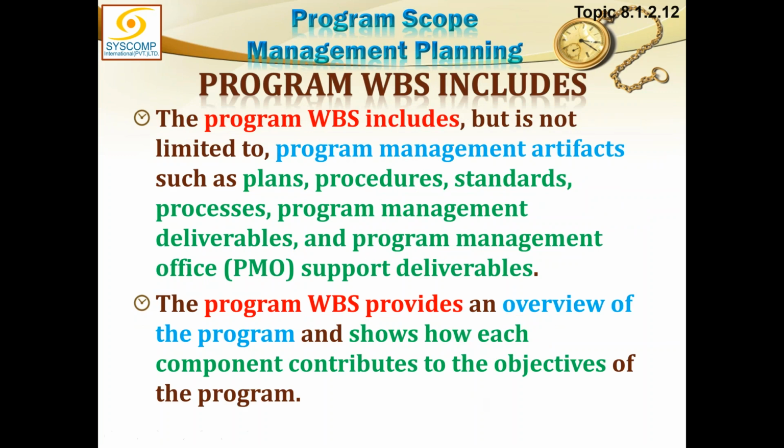The program WBS includes but is not limited to program management artifacts such as plans, procedures, standards, processes, program management deliverables, program management office support deliverables, and so on. So the program WBS is not restricted to the components or projects only.